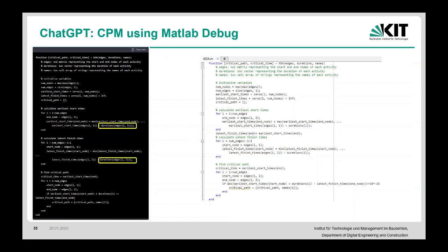So what it was doing, it was getting the first and the last, okay? And then basically the edge 1, I, and 2, that would be the end, edge I, basically which row that is, and the first one, that would be the start. Basically what it's saying is that the earliest start time for the end node is going to be the earliest start time of this plus something, right? What it's plussing is the duration of the activity on the end node, which doesn't make any sense because the edges don't have durations, right? But you get an index based on that, right?